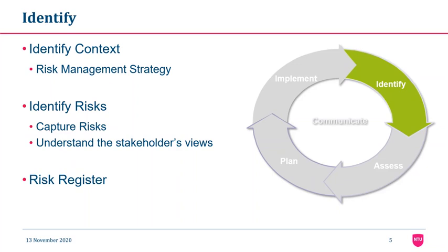And something similar. In this stage, you also need to create a risk management strategy for the project, and this will provide information on the risk management procedure to follow, the structure of the risk register, risk categories, reports and responsibilities, and also scales for likelihood, impact, and proximity of risk that need to be completed in the risk register.